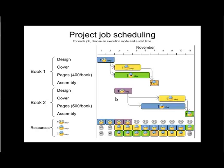On day five the design for Book Two is ready and we could start producing the cover and pages, but both our workers are still busy — one on the cover and one on the pages of Book One. So we have to wait yet another day. Then one worker becomes available and we start making the pages for Book Two, choosing pages first because they take longer — longest job first.